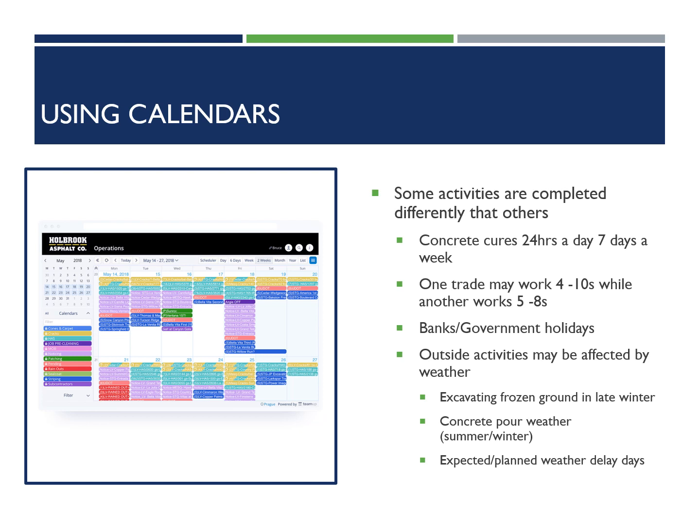I basically take the averages from the last 10 years and say that will give me the number of days for the month, and then I scatter those days randomly throughout the calendars, month to month. Any activities that I have that are going to be outside activities, I use the outside activity calendar for, and then it automatically impacts my schedule.